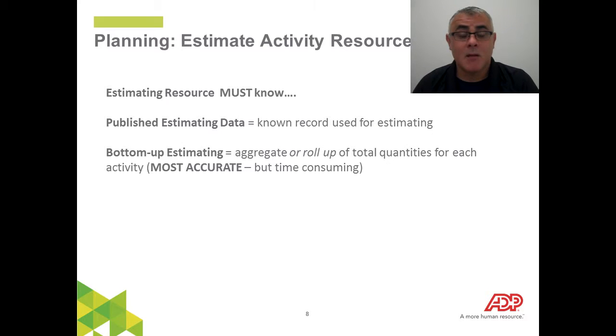Bottom-up estimating is going to become a little more relevant when you estimate durations, and that's in our next process. But bottom-up estimating is an aggregate roll-up of time or resource requirements to give you an overall, bigger picture, more exact amount of estimation or quantity of something that's going to be needed. So bottom-up estimating is going to become really important, and I just want to point that out now because it is part of your estimate activity resources as well.